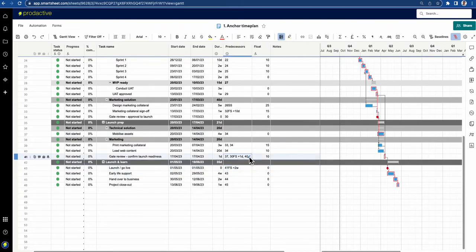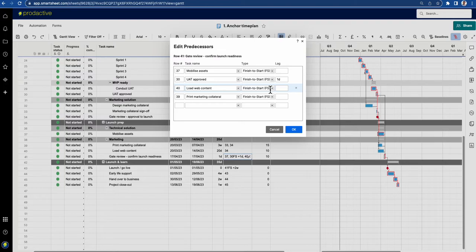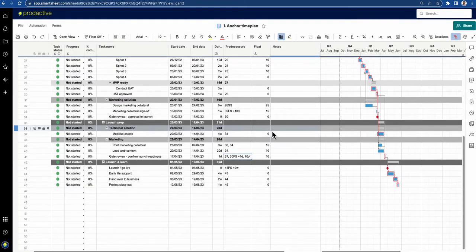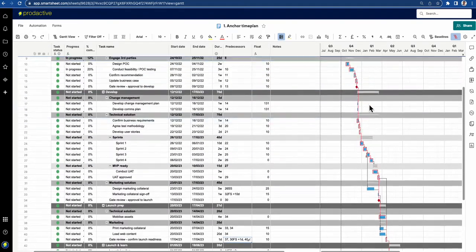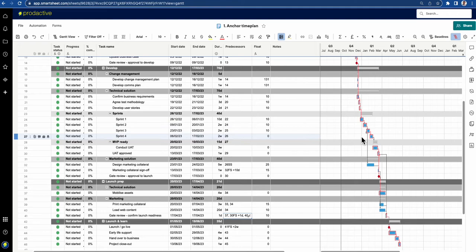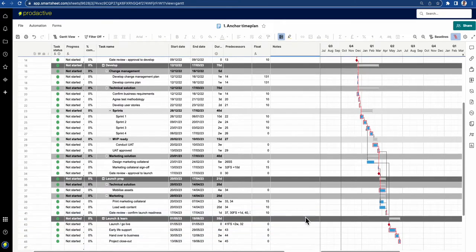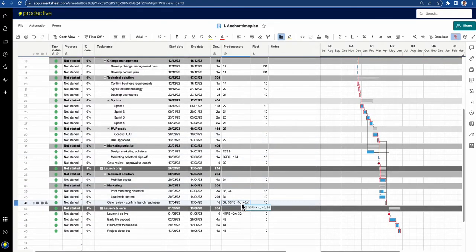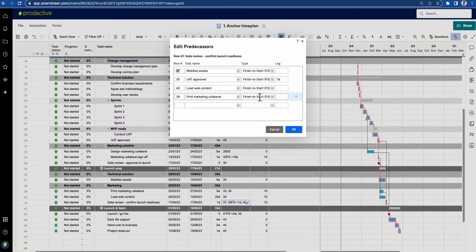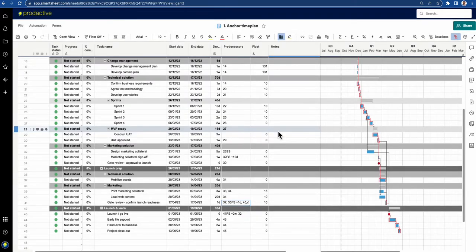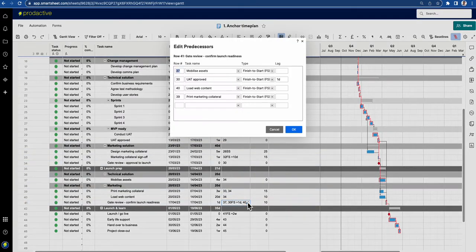You can add a series of predecessors, and one way of adding them is by dragging between tasks. For example, if I wanted to add a dependency to the go-live date, I can drag it down and you can see that line has been added and it appears in the list of predecessors. I'm going to take it out as it's not needed — it can be added by dragging or by typing it in here.